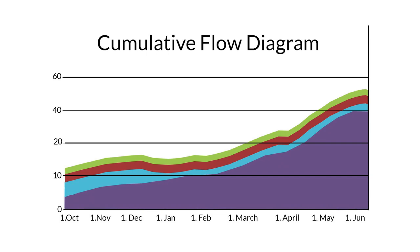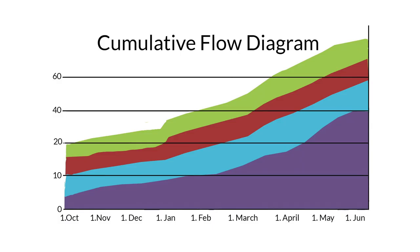Here, we can notice a sudden reduction in the height of the bands. Apparently, at this point, more items are being completed than are arriving. It shows that there are too many hands at this stage, and you can reassign them to a different process to better use resources while keeping this process still on point.